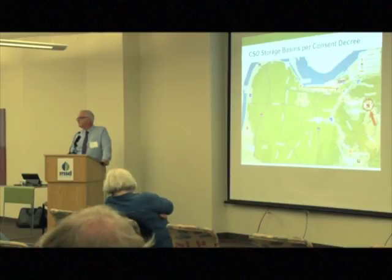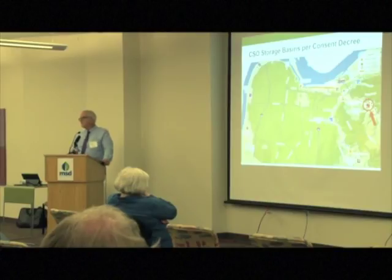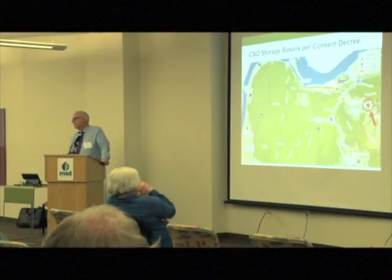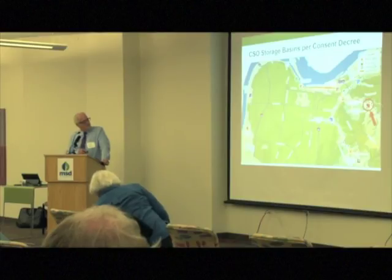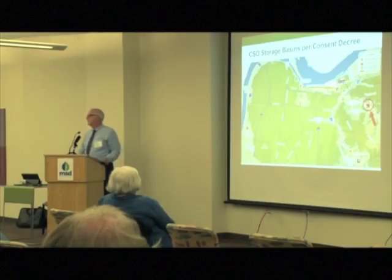Yes, ma'am. I'm a little confused about whether the basin that we're talking about today covers 3 CSOs or 4, because one of the written screens said 3, but then there was another map that showed 4, and that was confusing. So there's 3 CSOs that contribute flow to the basin as part of this project. The 4 CSOs in the general area, and it's being handled with internal modifications to the CSO structure. So as part of the overall project, there is 4 CSOs, 125, 126, 127, and 166, but only 3 of those will contribute their flows to the basin. The other one is just being modified, so it stores more sewage.